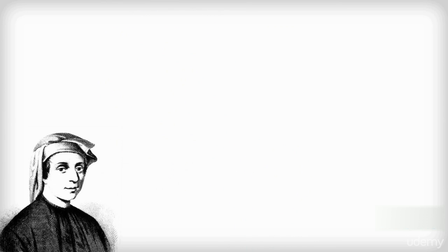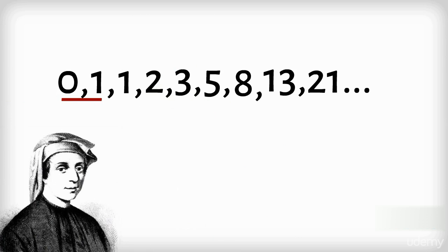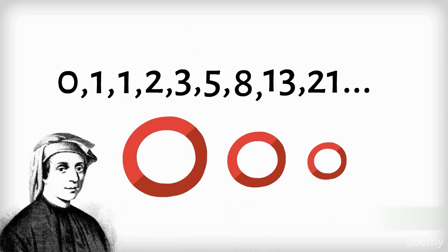They follow a number sequence as follows: 0, 1, 1, 2, 3, 5, 8, 13, 21. Adding the first two numbers together gives the next one. From that point on, adding any number to its predecessor gives the next number in the sequence. In short, studies have shown that these particular numbers marry well with the way we compare relative sizes, and therefore they became popular for estimating.